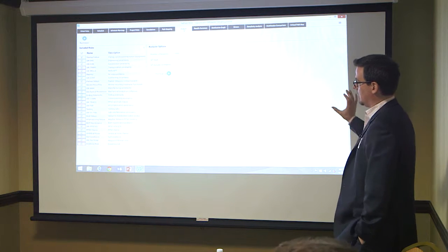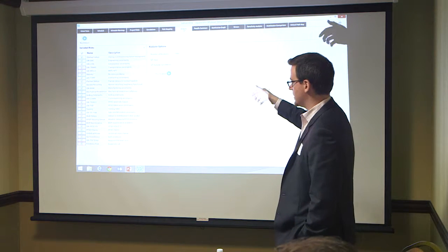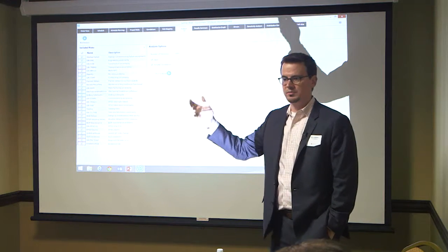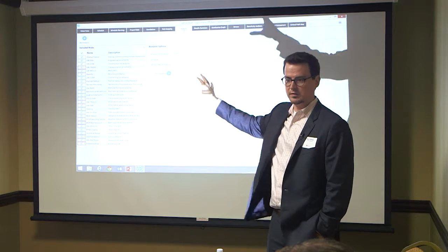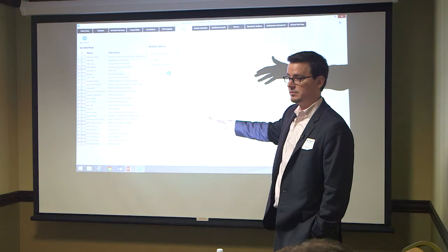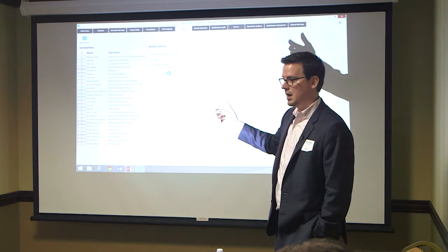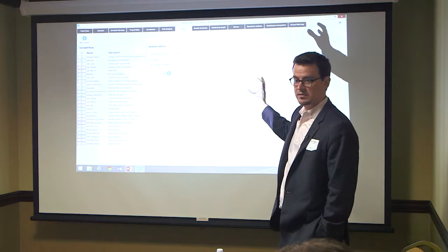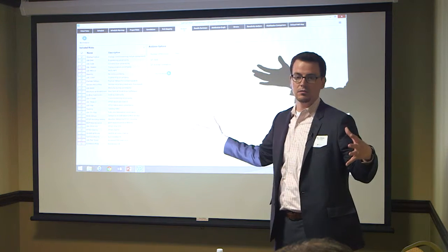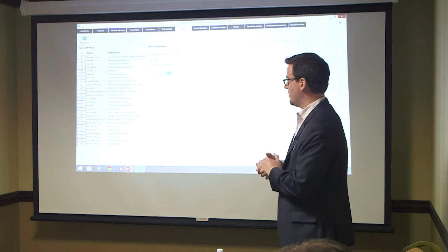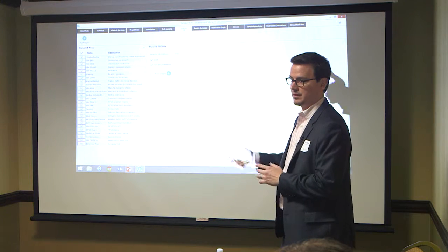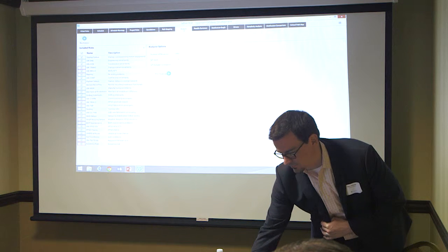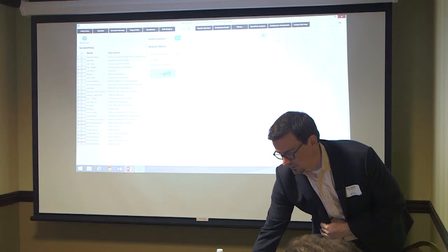Okay. So I want risk analysis. I've got some options here. And again, this is where I can begin to think through, are there some scenarios that I want to explore? Right, so I've got a set of risks that I've defined, probably that full comprehensive list of risks that the team's identified. I may want to run all of them just to get an overall risk baseline and say, what's the worst case scenario, right? What's it look like if I run everything? And then I can come back and work through a different set of scenarios and select different risks to look at. Right, so I'm going to go ahead, run the analysis.